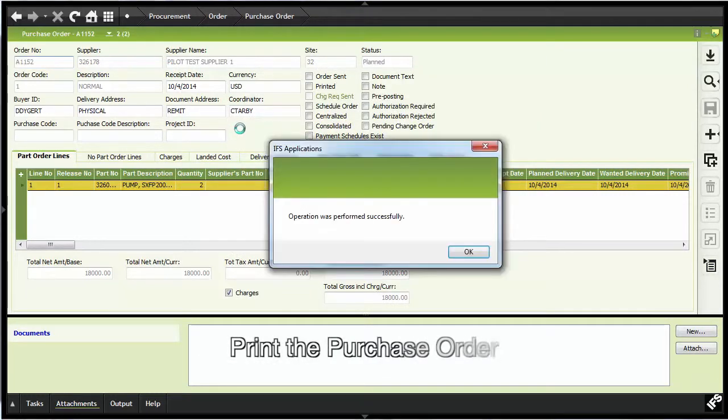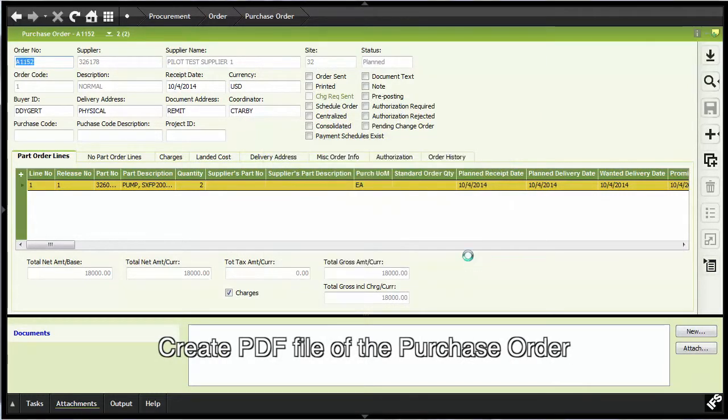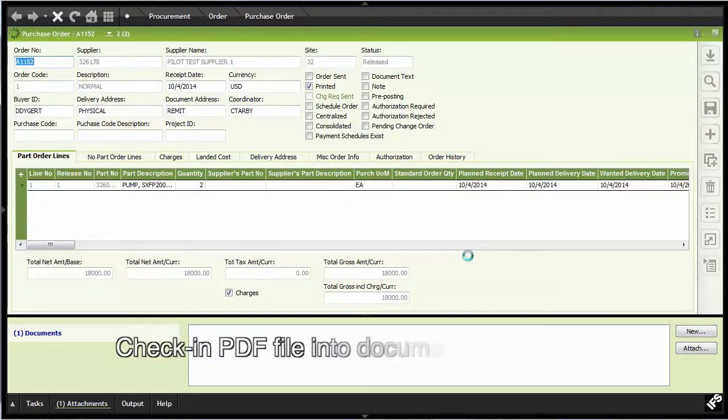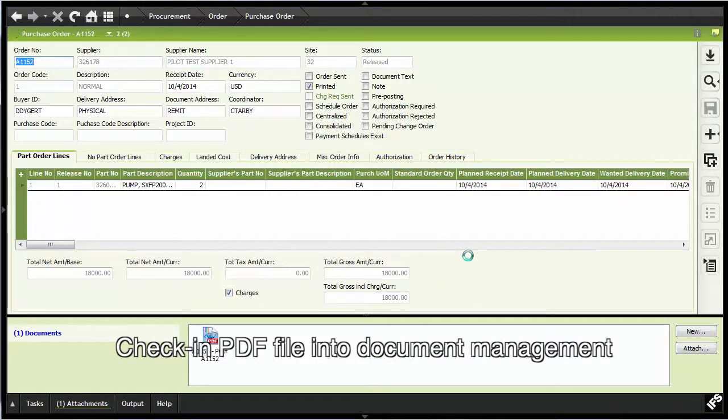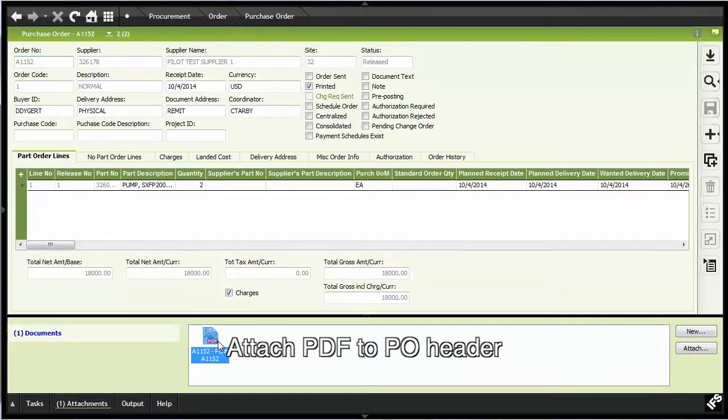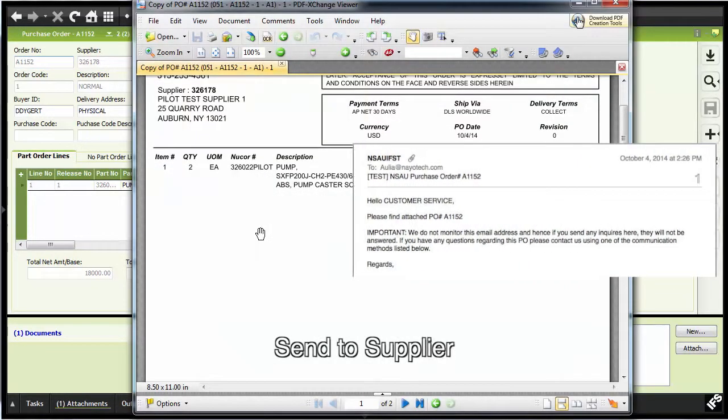the automated process creates the purchase order report as a PDF file, checks it into document management, establishes the object connection to the PO header, and then electronically sends it to the supplier.